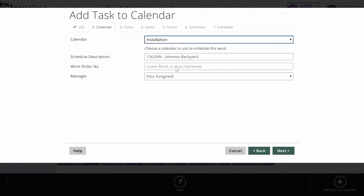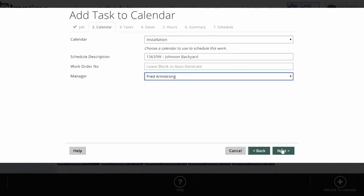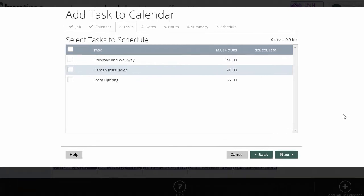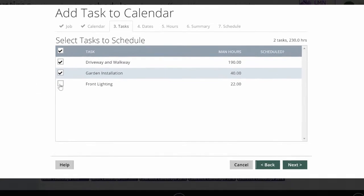I can also specify a work order number and a manager if I'd like. Now I want to pick the tasks on this job that I want to schedule and click the top one for all the tasks. Or if I only want to schedule some of the tasks, I can do that as well, and it'll only schedule the man hours I've selected.